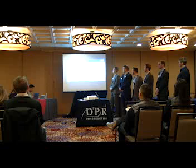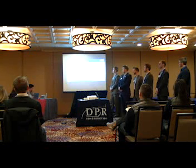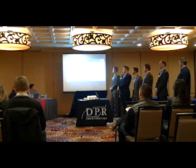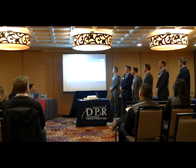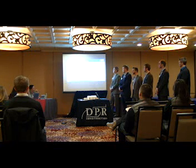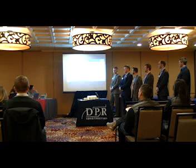And then finally, precast floor panels. We would have all of our concrete floors precast into different sections, and then we would use just-in-time delivery to bring them to site so we don't take up material storage. And then we would have them picked directly off the truck and dropped into place. And we believe that with this just-in-time delivery, we can help accelerate the schedule.